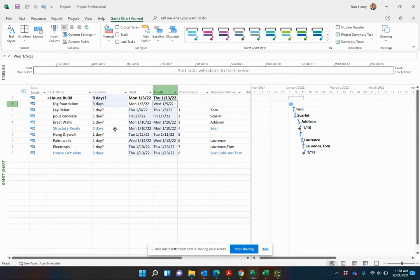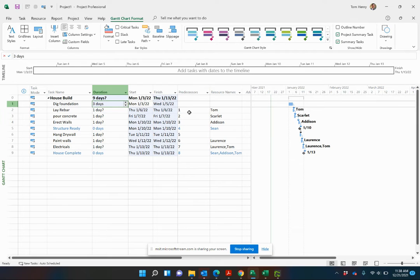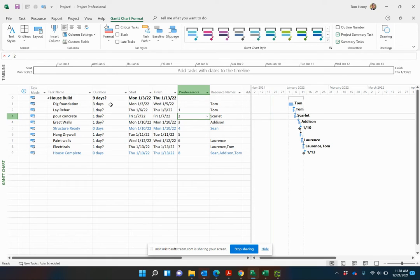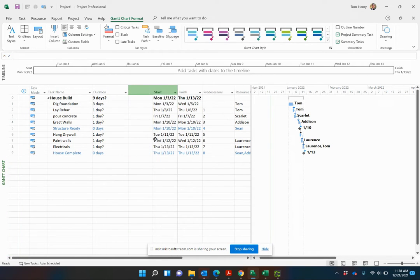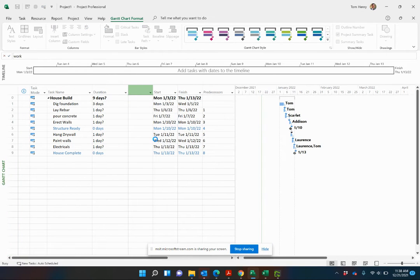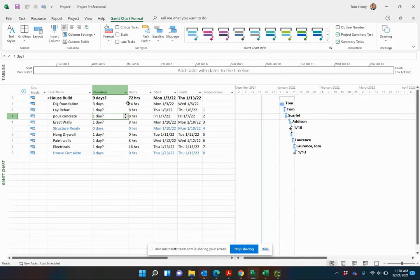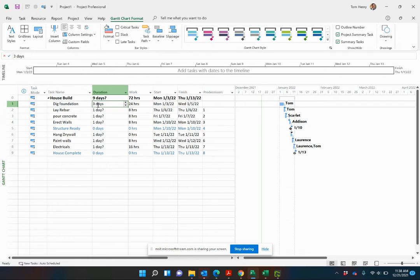What I want to do though is show you how to estimate the work. What do I mean by that? Well, this task, Dig Foundation, goes on for three days. And if we assume that one person is working on it, let's say Paul is working on it, that work would be if he's working full time, we're talking 21 hours for that. If I actually right click on start and put insert column, work, 24 hours. Maybe my math wasn't working. That's why we have Microsoft Project to help us.